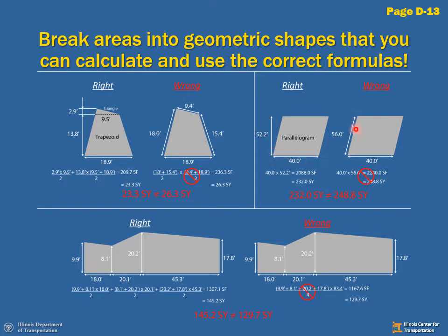That would be incorrect. Here we have an area which may be, here's the road and we're going up an embankment for sodding, seeding, mulching, something like that. We're taking individual height measurements right here, and we're going to average. We're going to calculate this area. They're not squares, they're trapezoids. And this area separately and add them all together. We can't average the heights and multiply by the entire distance. It just doesn't work.